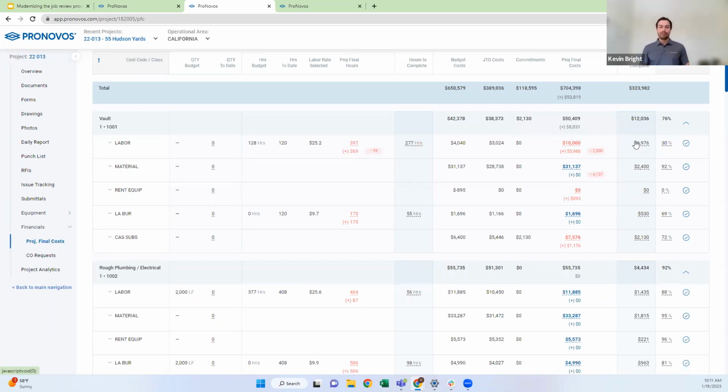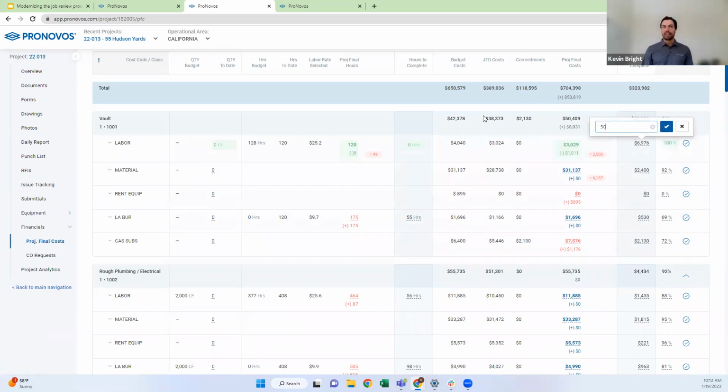And I would say if you're going through and you're updating the projected final cost, doing that lump sum adjustment, that's a really good thing to do, but it's not always going to be the best because usually it's going to be a bit of a gut check, right? You're kind of saying, hey, I had a $10,000 original projected final cost. Maybe I think I'll finish at 15,000. There's really not a lot of science to it. So there's a few other ways that you can update your projected final cost. And one of them would be updating your cost to complete. So let's say I don't know necessarily what my final number is going to be, but I know I've got one more invoice that's got to come in and it's going to be about $5,000. I can type that in and I can see how that's going to impact my projected final cost.